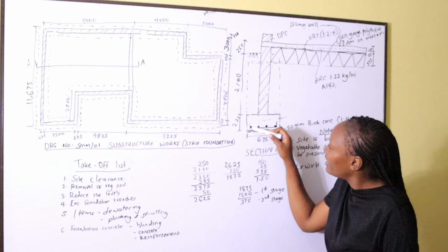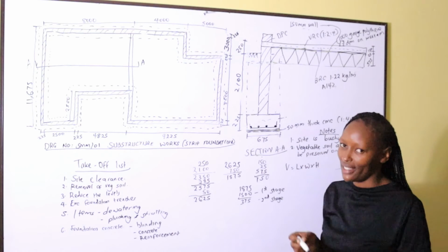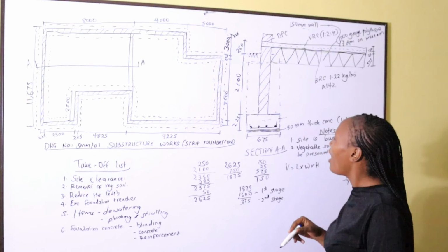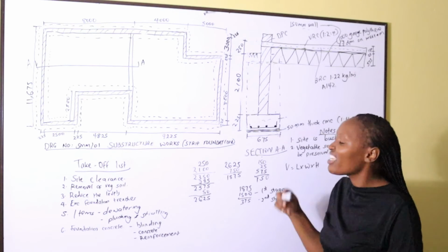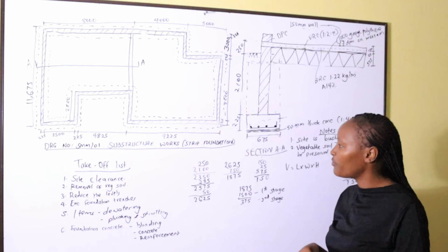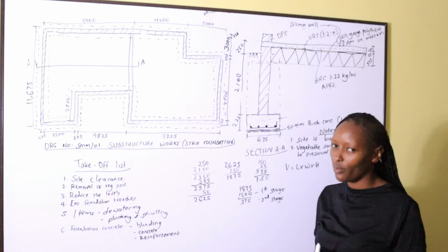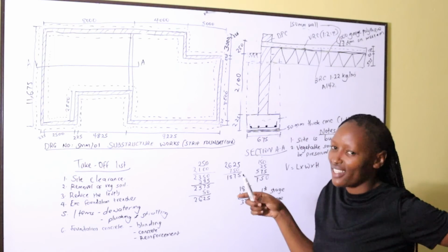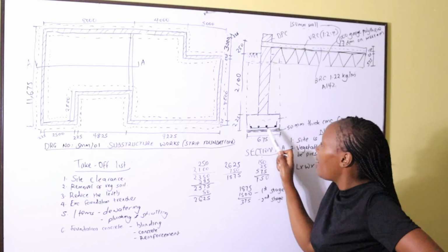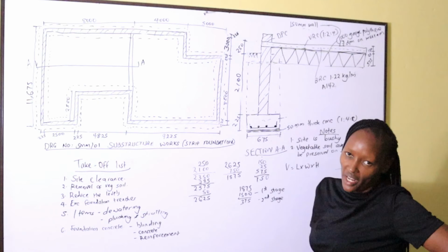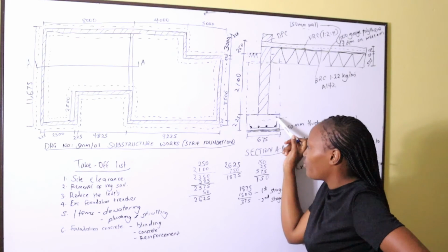Then we shall add these bends. Alright? So that we can add the bends, we could say the bends are 50 millimeters, because we have not been told. So we shall take 675 minus 50 plus 50 plus 50. Alright, that will be the length of one reinforcement bar.